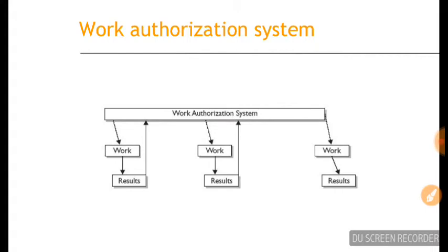Even if the schedule and everything is fine, ultimately if somebody has to start the work, the work order will be issued. Only then can they start the work. That results in better sequencing. Otherwise, a lot of errors can crop up, because the painter may come and finish painting, and after that the plumber will come. All those issues can crop up.